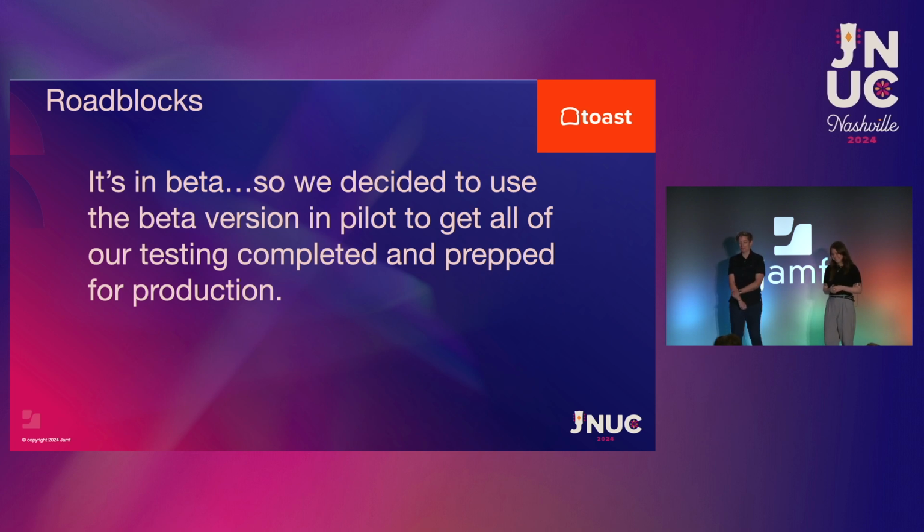We quickly found that it was worth waiting for this feature to make it into a production release rather than seeking out a completely different solution altogether, as the 6-month lead time we originally had would not be needed for purchasing, configuring, and deploying a brand new tool in our environment. We could repurpose this time to test out the new feature while it's in beta and have it ready to go when it's ready for production. And we sat on a lot of calls with Mike next door, begging and pleading him for a release date, and he was very good at giving us updates on that.